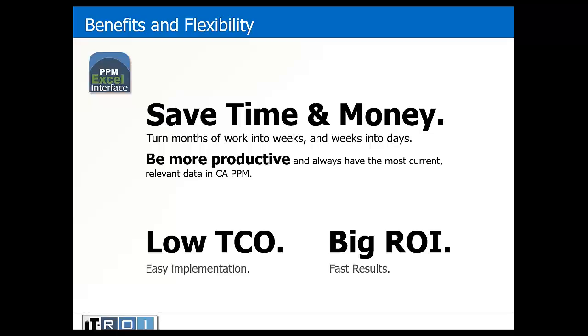The value for the organization is really in data accuracy. What do I mean by data accuracy? I'm going to give you a perfect example. We have a client that says, we're not necessarily sure if we're going to do the cost plan interface through Excel because we only update cost plans once a year. And I asked him, why do you only update cost plans once a year? He said, because it's so time consuming to update the cost plans that if we were to update them monthly, our project managers would do nothing but update cost plans.